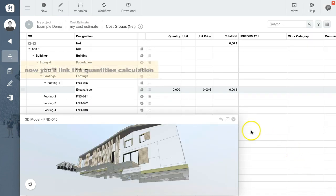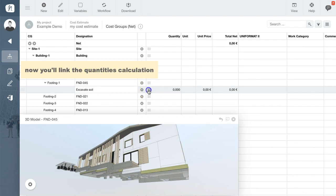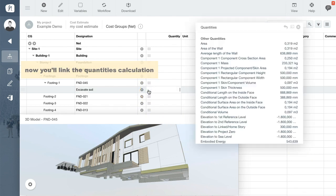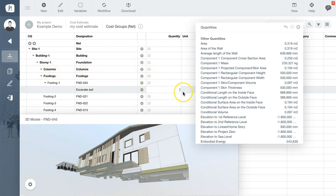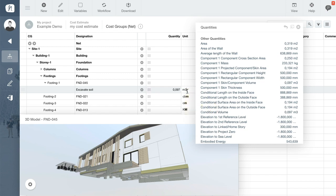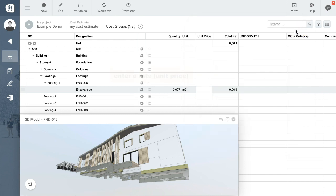By clicking the list icon in the Quantities column, you can define how the quantities of this work item will be calculated. Pick one of the measurements of the building element and then enter a measurement unit and rate or unit price.